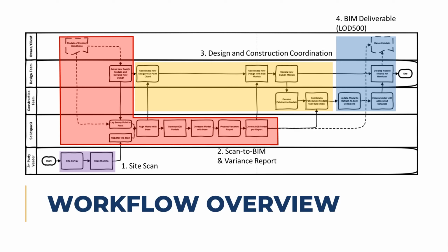We knew from past experience that we must have an accurate representation of the existing conditions before we move forward. The CAD drawings that we have with inaccurate information are not very helpful in this situation. So what we did was hire a third party to laser scan the entire site to have an accurate capture of the existing conditions.